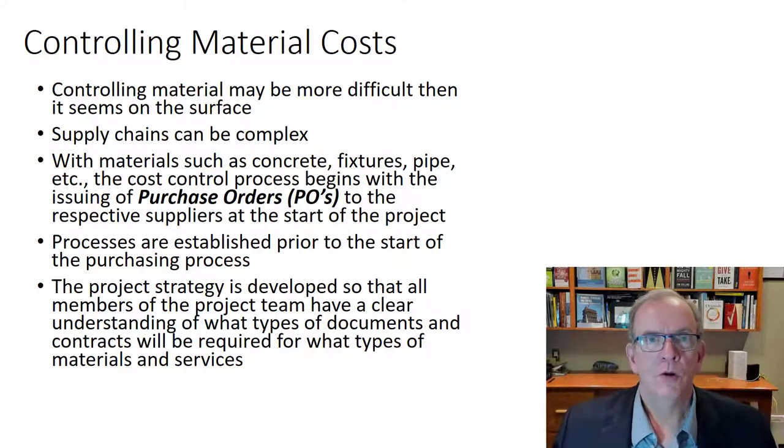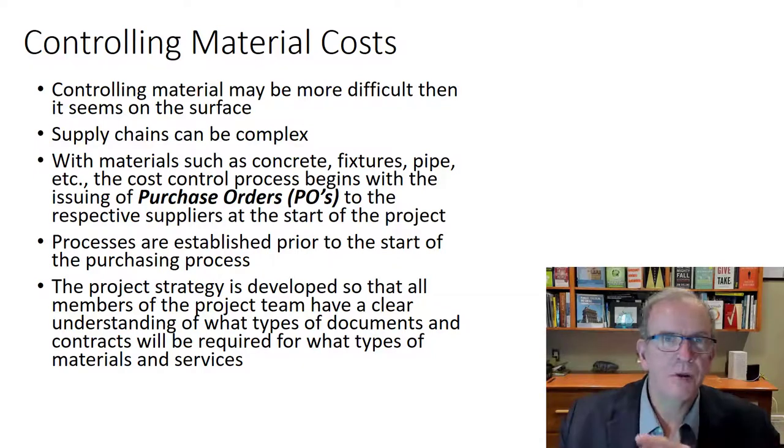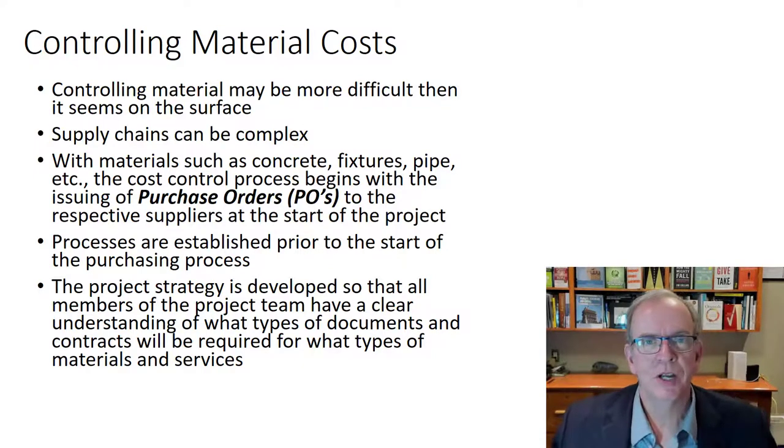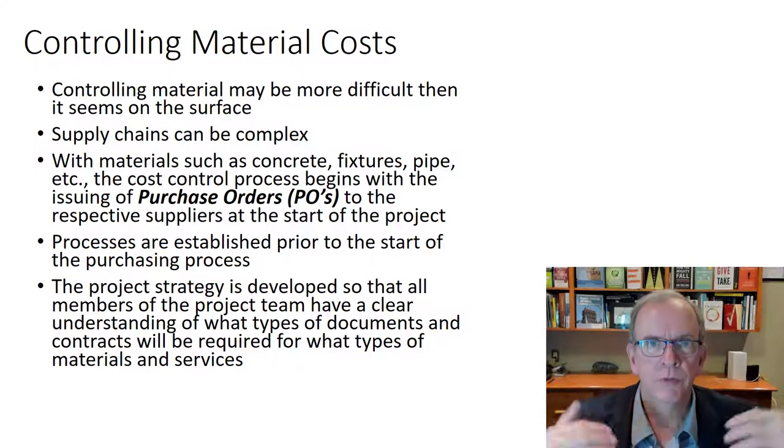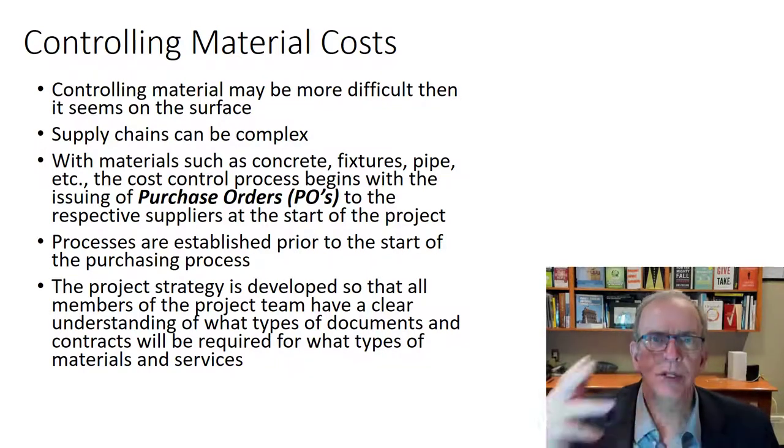Otherwise, all you're doing is seeing at the end of the year, did we make money or did we lose money as a business, right? You know how much money comes in, you know how much money goes out, and then you'd see the difference. That's fine, but you don't know which projects made money, which projects lost money. And then within projects, what part of the project made money, what part of the project lost money. So you can provide feedback also to your estimating department and your project team. And that's how the continuous improvement process cycles into running successful businesses.